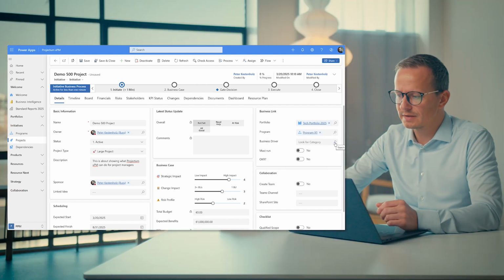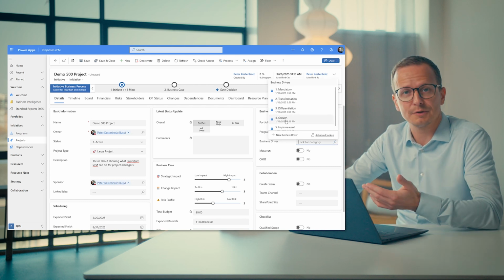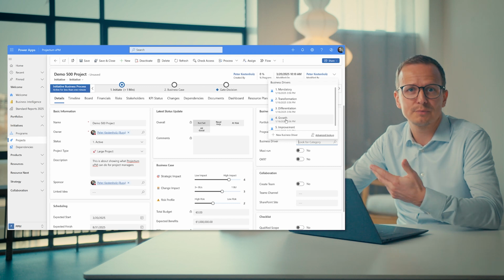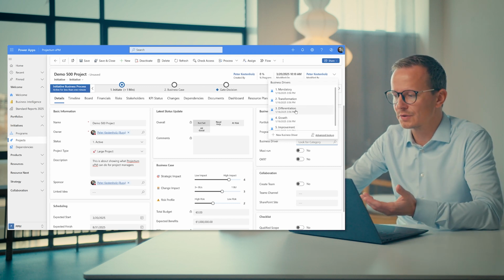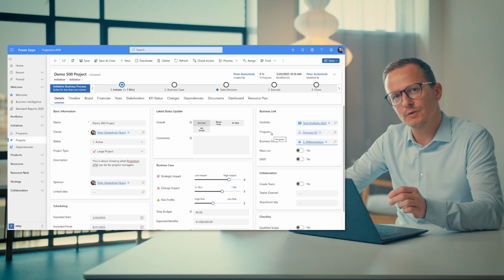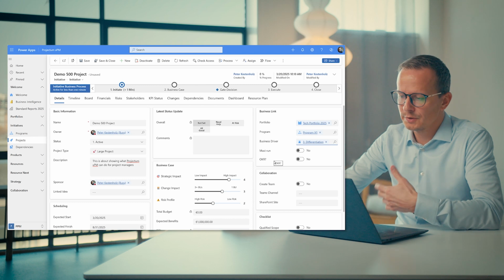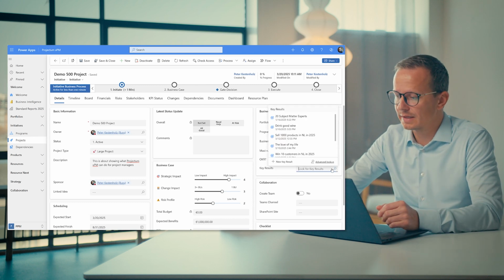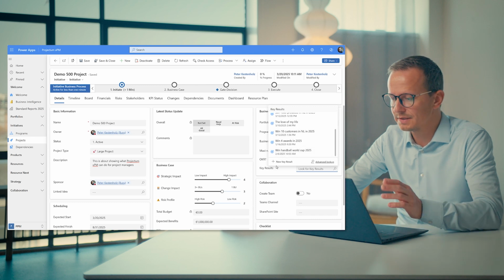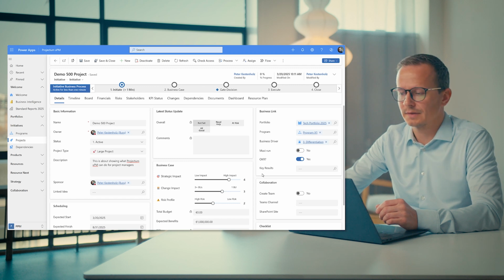And then we have business drivers that are typically more static ways of tagging your project against typical business drivers such as growth, mandatory projects, differentiation projects, improvement projects, or whatever we want to call them. But more dynamically, we can also connect a project to the strategy of the company. So here we use OKRs, objectives and key results, so that one project can be connected directly back to a part of our company strategy. So we can see what initiatives are providing value towards executing our strategy.